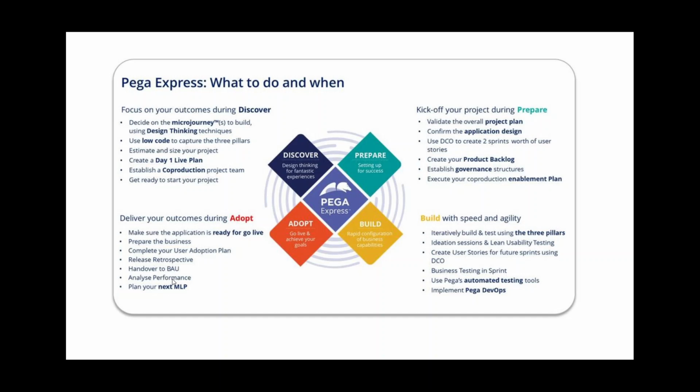So if you see the general timelines, the discover phase involves only the sales team and it will be around 1 week. Coming to the prepare phase, it will be around 1 to 2 weeks. It involves all the business stakeholders. From the client side, it involves business SMEs, the product owner, and one Scrum team. One Scrum team means two system architects, one QA, one Scrum master.